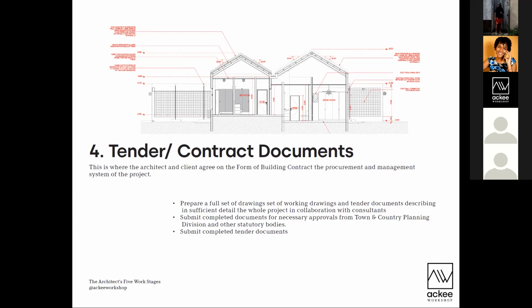We're also submitting documents to possibly Town and Country to get approvals, and also to other different bodies that we will need to get approvals from, maybe like EMA, etc. And you're also submitting drawings to be tendered by different contractors. And this is where the architect turns from just dealing with the client into being somewhat of a mediator between the client and the contractor, the person who is building the project or the person who's organizing for the project to be built. Okay, so that sums up